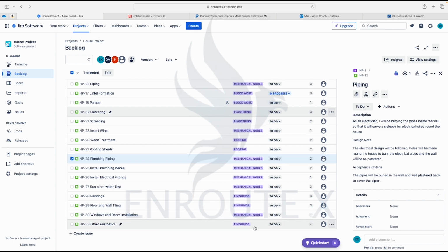The idea in Scrum or in Agile is that, and I tell my team that no particular effort should go beyond 5 story points. Any work that is getting to 5 story points is big enough. That means if your story point is 1 point to 1 day, that is a 5-day work, right? So as a rule of thumb I use with my team, this is not a general consensus, but as a rule of thumb I use for my various teams, any story should not exceed 5 story points.